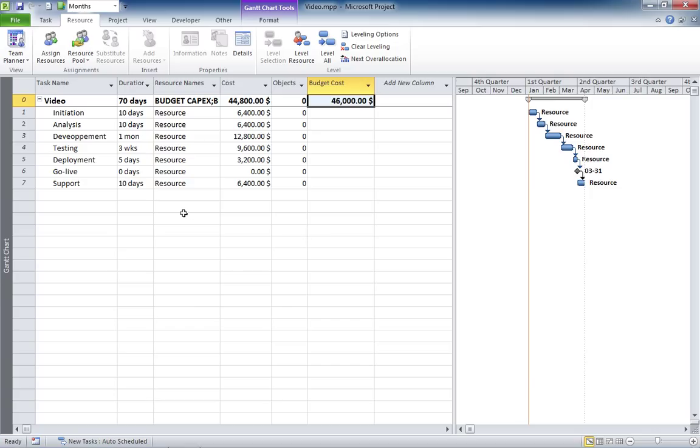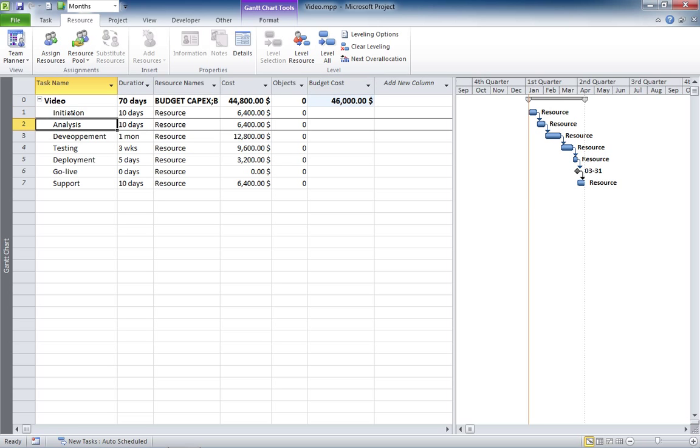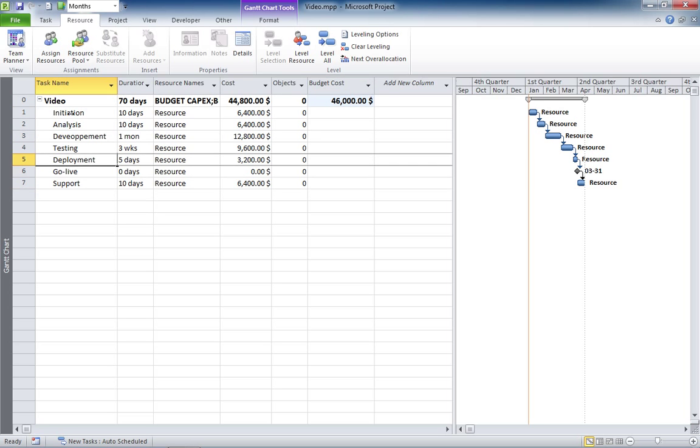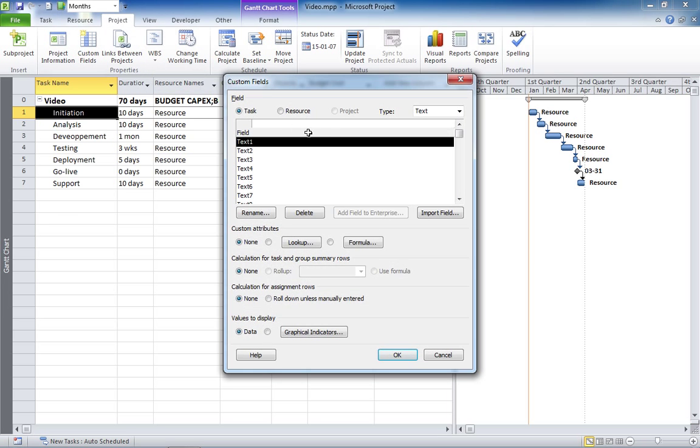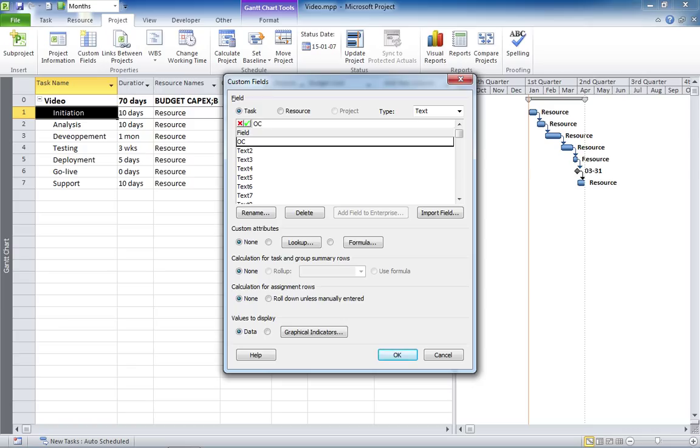The next thing to do is to classify each of the activities here in your project as OPEX or CAPEX. The way to do this, you're going to define a custom field, let's call it OC for OPEX-CAPEX, that will be used to discriminate between the different types of tasks.